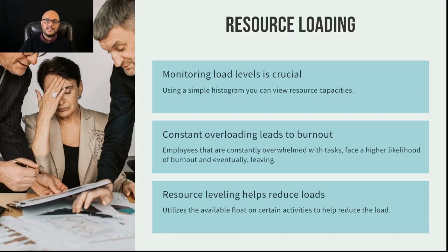Monitoring load level is absolutely crucial as part of your role as project manager. You can use different tools here. You can even use a simple histogram chart just to show you the different capacities of each person. You need to monitor the load of each person because as you overload people, it can eventually lead to burnout. If Mike is constantly working 15 hours a day for a month, he's going to burn out. What happens when people burn out for long periods of time? They're likely to start looking for another job. Burnout leads to a lot of negative consequences.